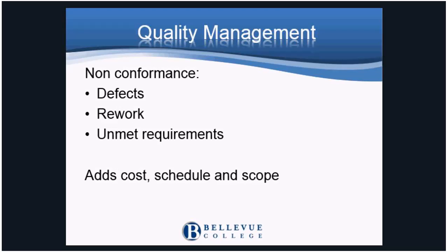The effect of nonconformance can be seen as adding avoidable costs to the project. These costs can be increases in spending, time to complete, or additional scope. Defects are nonconformance, what the customer doesn't want. Defects can either be a mistake or it can be delivering the wrong things, even without mistakes. Imagine asking for an ice cream sundae, but they use shaving cream instead of whipped cream. This would be a defect because it was made incorrectly. But if you received the perfect sundae and you wanted a milkshake, the sundae would also be a defect.